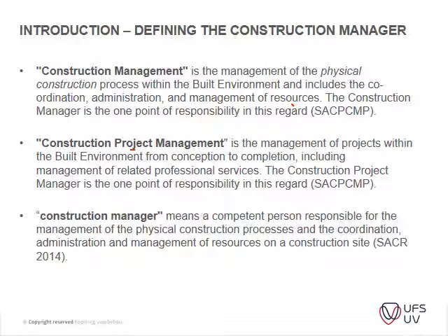whereas the construction project manager is the management of projects within the built environment from conception or inception, what do you want to call it, including management of related professional services. Construction project manager is the one point responsible in this regard. Another definition to differentiate between the two is the construction manager is usually involved from stage 4 to 6, whereas the construction project manager is involved from stage 1 to 6, and fulfills a consultant type of obligation.